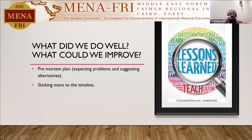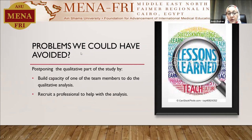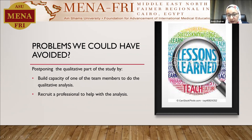In terms of what could we improve — definitely sticking more to the timeline is something we should work on to compensate for the delay that already happened. In terms of problems we could have avoided, we could have avoided postponing the qualitative part of the study by building the capacity of one of the team members to perform qualitative analysis from the beginning, or by recruiting a professional to help with the thematic analysis. Thank you so much.